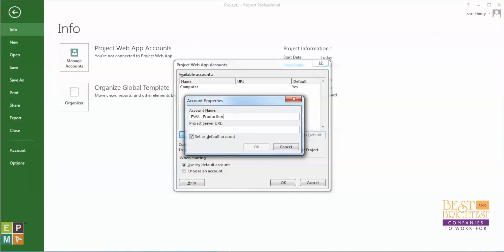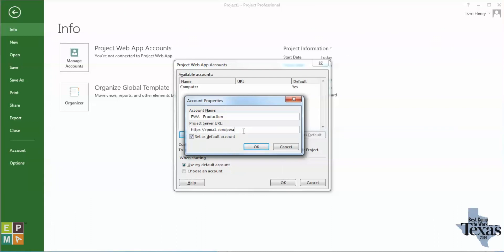It can have any name — you could call it 'Tom Henry' if you wanted and it would still work. I do now need the Project Server URL. This should have been given to you by your IT department or your Project Server administrator. Let me give you an example of what it would be — I'll just type in here: HTTPS://EPMA1.com/PWA.